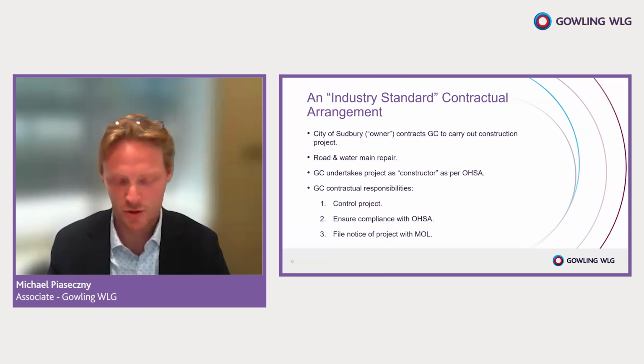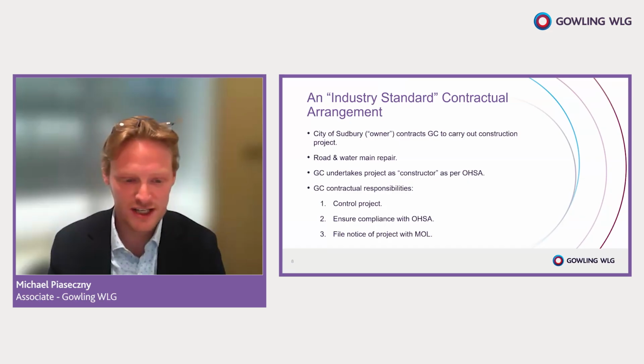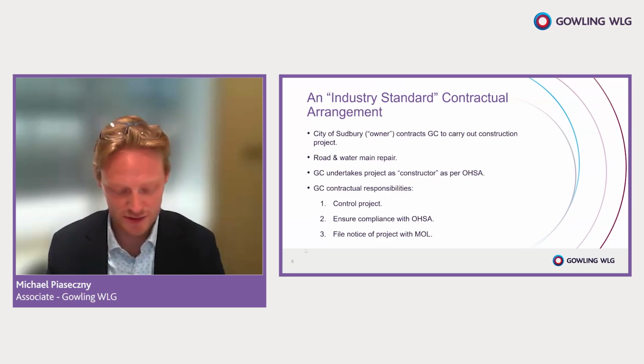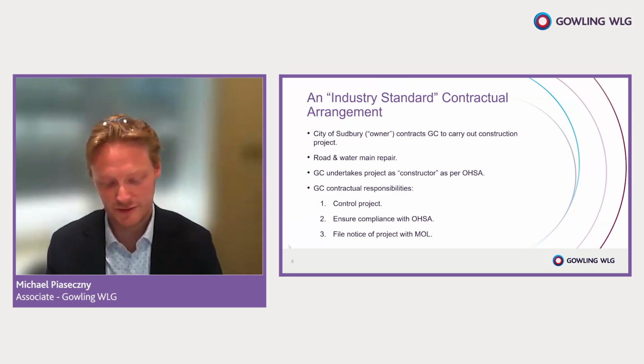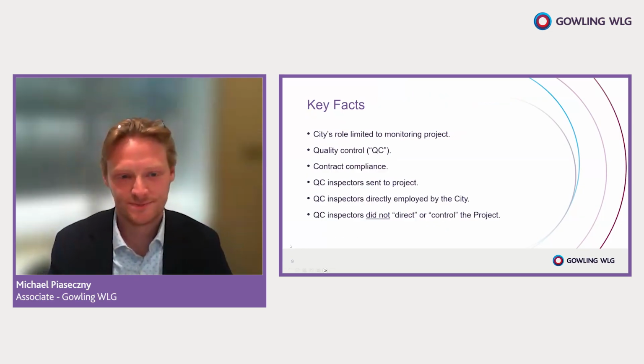So there are three main components. The general contractor controls the project. They ensure compliance with the Occupational Health and Safety Act, and they file notice of the project with the Ministry of Labour. Next slide, please.